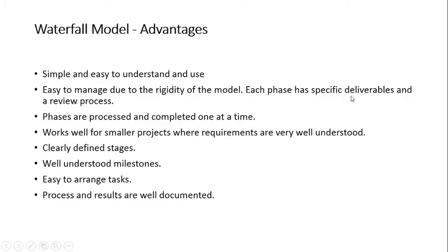Each phase has specific deliverables and a review process. So ultimately you're getting an output. Your output acts as a deliverable which helps us in measuring the progress. Like if the feasibility report is complete and released, what does it mean? The task of the feasibility study is completed. If you get an SRS document, that means the tasks relevant to requirements as well as the previous phases are completed, so you can easily check the progress also.